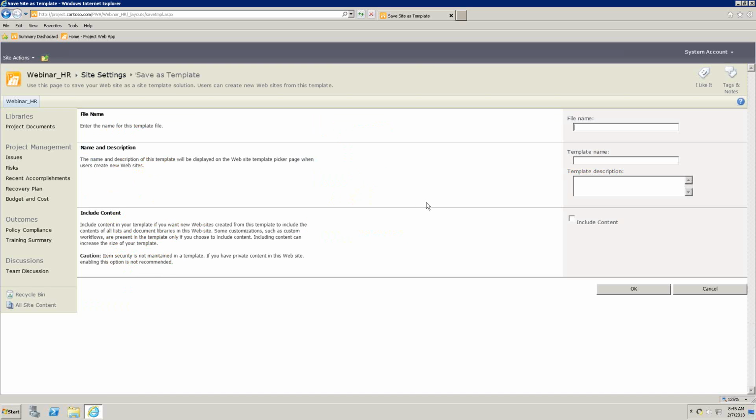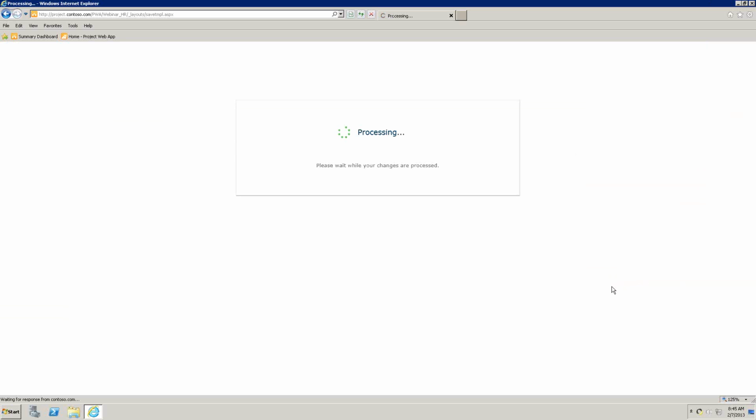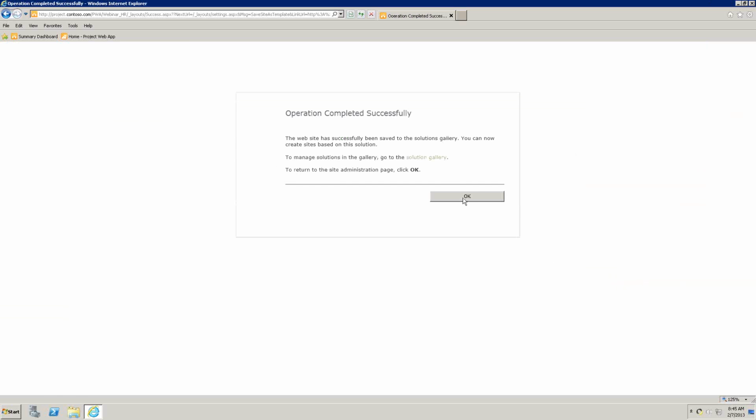and give it a name. I'll call this webinar _HR. And I will use the same name as the template name, just so I don't confuse myself. And I will not check the box to include content. And that way those issue and risk items that I created, those other entries, they're not going to go along with the template. It'll be a blank template. So we're processing. We're successful.